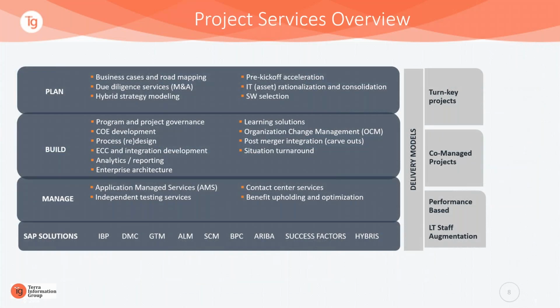And our project services overview. We plan, build, manage SAP solutions. These are our 4 different things: planning, building, managing, and from a solution standpoint. We do turnkey projects. We do co-managed projects. Sometimes we are brought in to help co-manage a project with the internal team, as well as sometimes the SAP team. We always have a performance-based model from a payment standpoint. We only get paid when we reach milestones that are agreed upon and signed off.